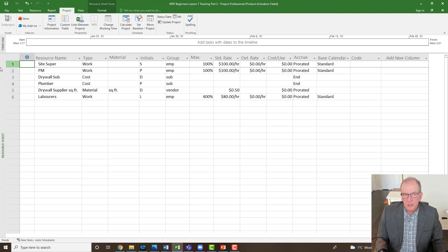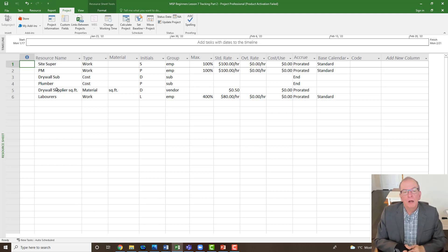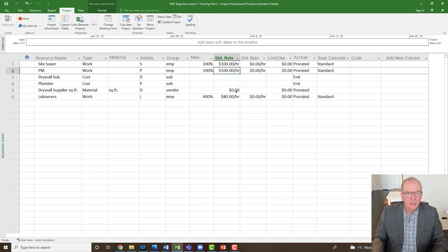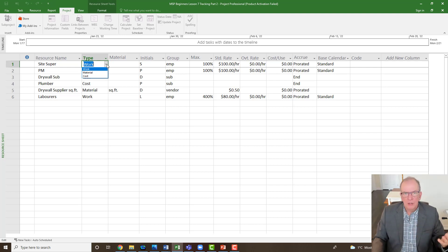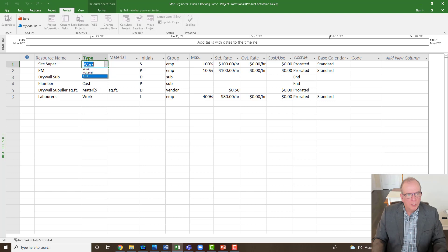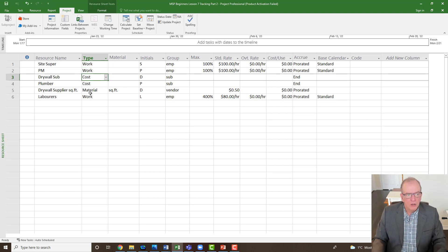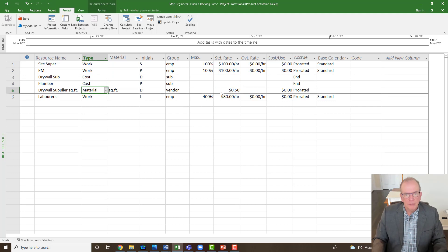If I slide to the resource sheet, you can see this very simple resource sheet — I've got site super, PM, drywall sub, plumber, drywall supplier, square feet, laborers. I put in some costs and rates: a hundred dollars an hour for the site super and PM. Drywall supplier is set as a material type. There are three types to choose from: work (hourly rates), cost (add costs later), and material (something measurable like drywall per square foot).